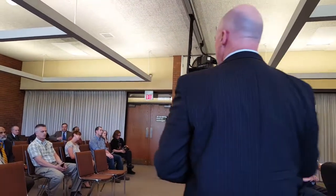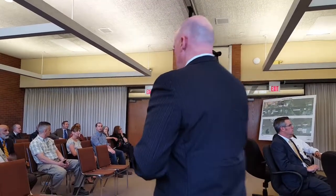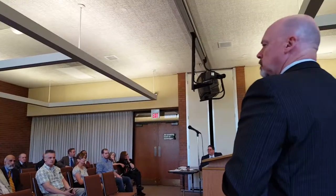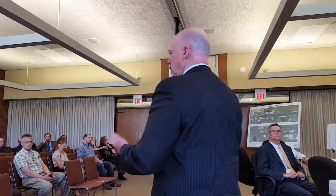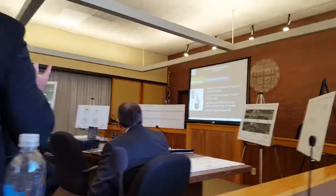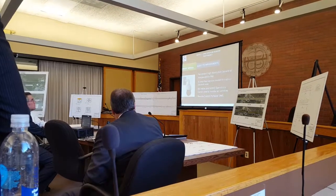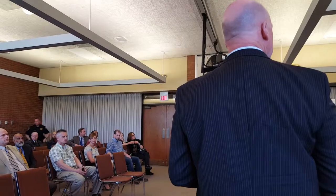There's also gonna be, Nick, 2 or 4 DMS, portable DMS, I forget now. I think it's 4. 4 portable dynamic message sign boards that are remote controllable. So they'll be able to change the message from the operation center, if need be. During construction, the same signs will let motorists know that there's lane closures in place to do the work. So there will be camera views throughout the approximately 2 mile limits of this project.